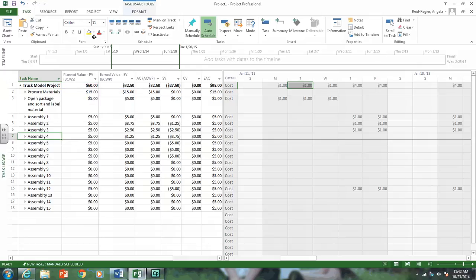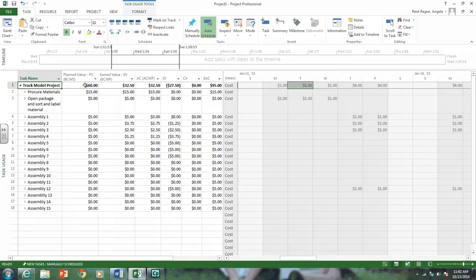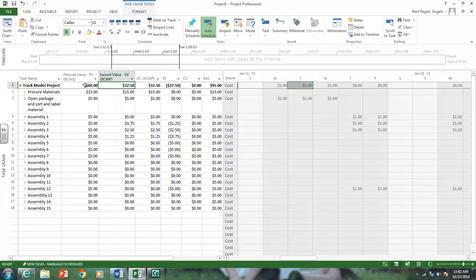As we can see, again, our plan value, we should have done $60 worth of work. Our earned value for the total project is $32.50. Those are two important values that you need to note.